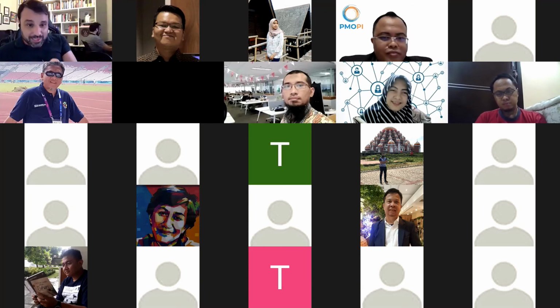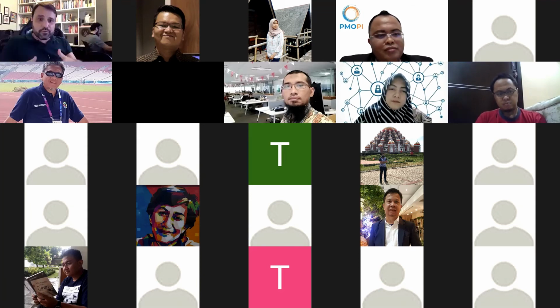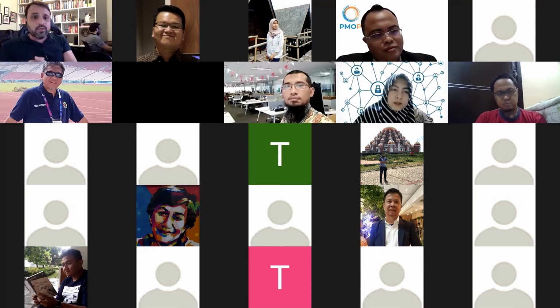Even PMOs, that's something interesting. Do you believe that every company in the world should have a PMO? The answer is no. There are many companies where a PMO doesn't make sense. And why? Because they don't have enough projects. They are not a company with a size that justifies a PMO.